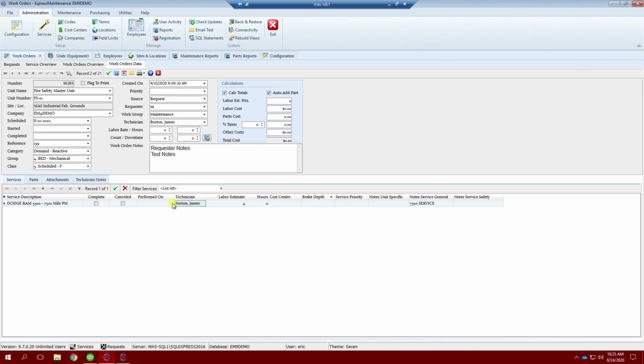I want to know what date this service was performed on. That's different than the work order completed date, because if I have multiple services on a work order and I complete them at different times, then I want to know which services were completed when. Unless they're always completed on the same date, then there's another option for that. Then the technician field and labor estimate. It's great for planning and scheduling to have those labor estimates in there. And of course, you can default those by adding them to your services list here.